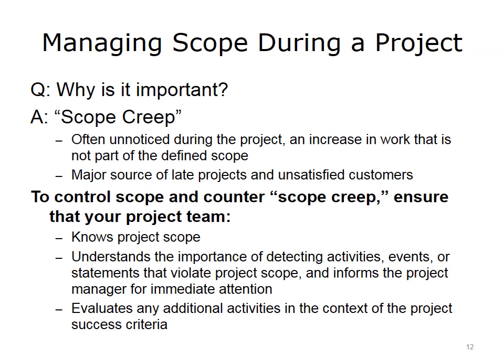For example, a customer may say, "Then the system will update the database in real time, so the database is current." If in fact that's not what's really going to happen in the system you're building, it's important for you or your team members to speak up and remind the customer that this isn't part of the current requirements. Such a comment could become a de facto requirement if it's not immediately challenged and corrected, and the scope is increased in a very innocent way. You have to be clear about what's in scope and how customers and other stakeholders appreciate the importance of all elements of the project remaining within scope.